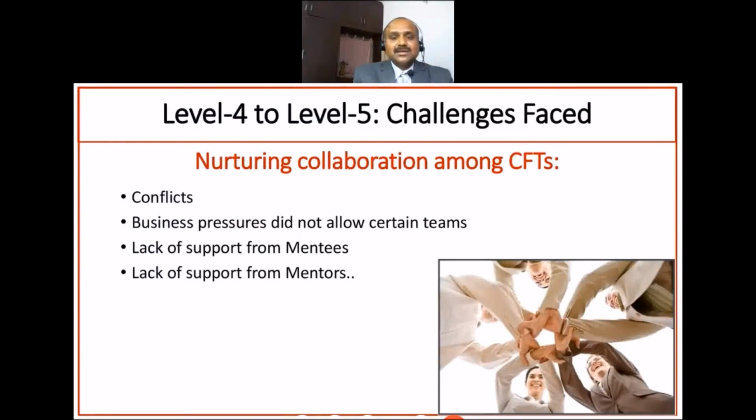For example, certain times 70% Scrum, 30% Kanban, probably that is one of the options where we can deal with this business pressure, so that business gets what they want. At the same time, 70% bandwidth, the percentage is just relative. You can follow 60-40, 50-50, whatever it is. But at the end of the day, we say, okay, towards ad hoc work, we provide 30% bandwidth. To our regular forecasted work, we provide 70%.